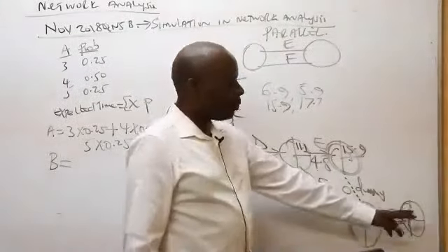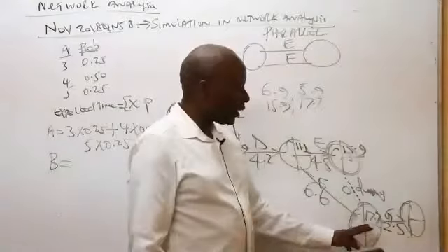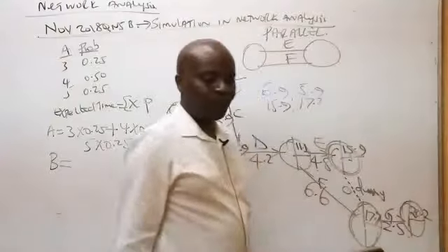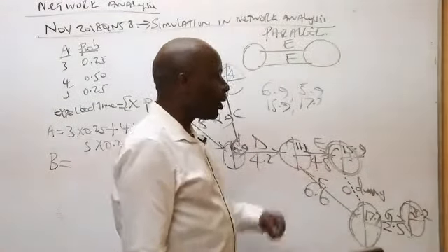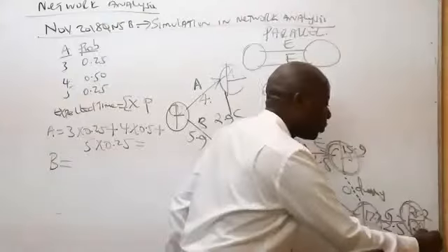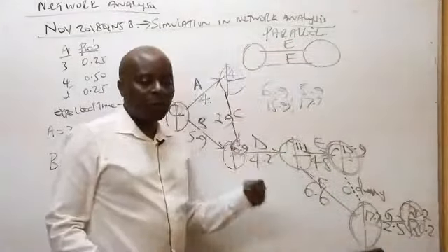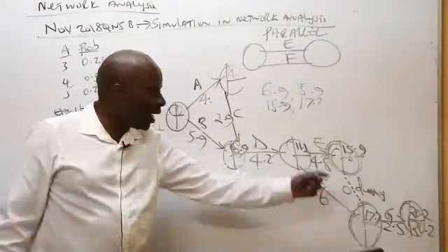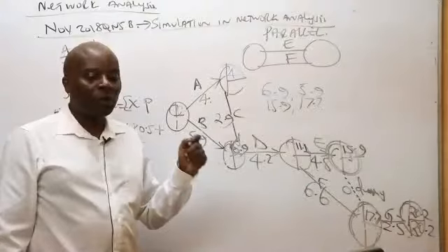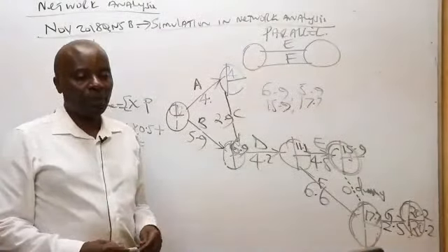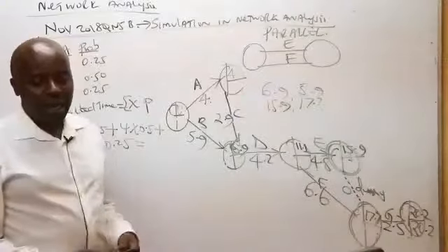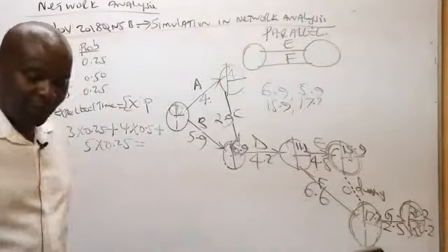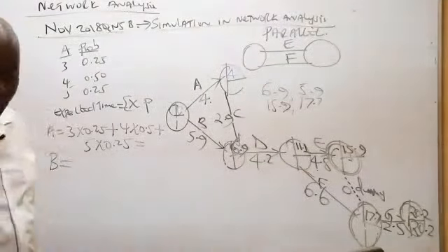And then, of course, there is no comparison here. So here I take 17.7 plus 2.5, which gave you, ladies and gentlemen, 20.2. I will put 20.2 here at the very end, and then now you subtract backwards. Now it's the backward pass. You move from the end, subtracting backwards until we get a 0.